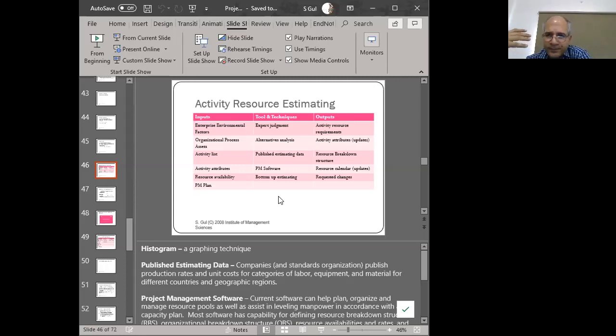But there are many things that we're doing for the first time. In that case, we don't have a top-down estimate or a heuristic. So we have to go through this decomposition, and then we estimate at the smallest level, and then add those estimates upward and say, well, overall, this is how long that particular activity would take, or this is how many resources we're going to require to perform this activity and so forth. If we're doing that, that is called bottom-up estimation.